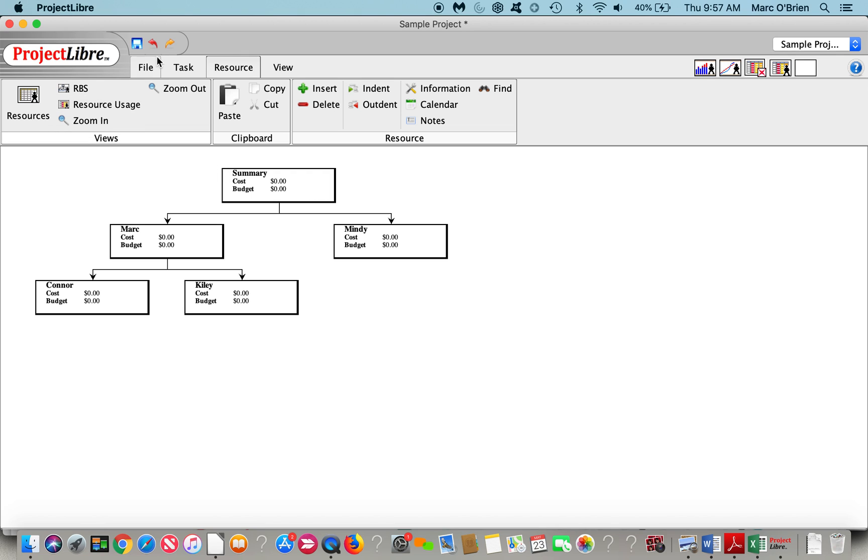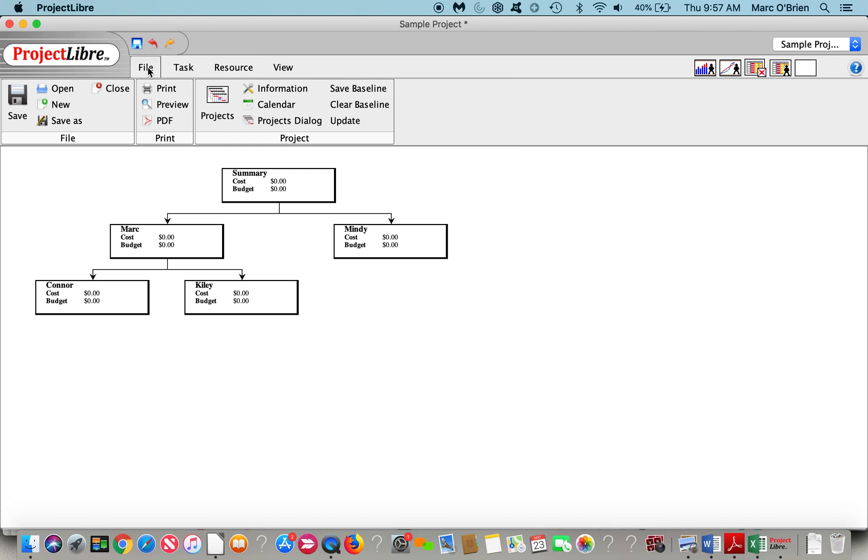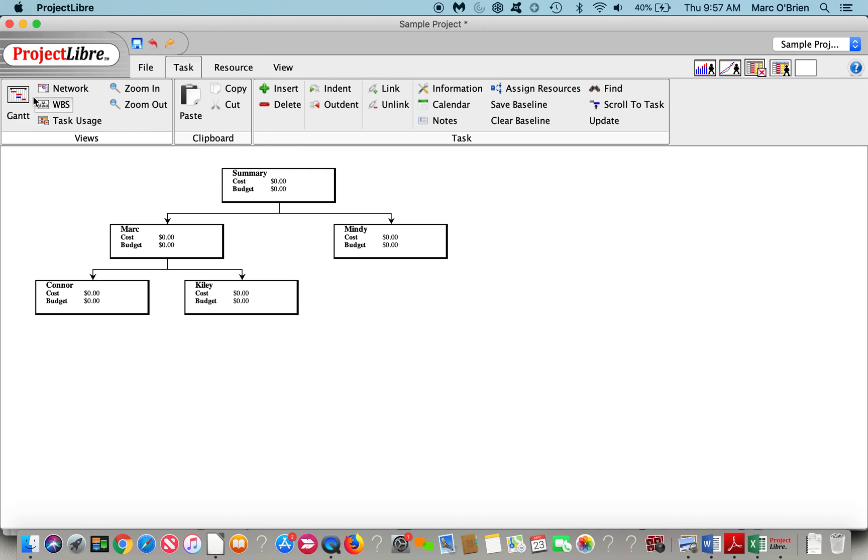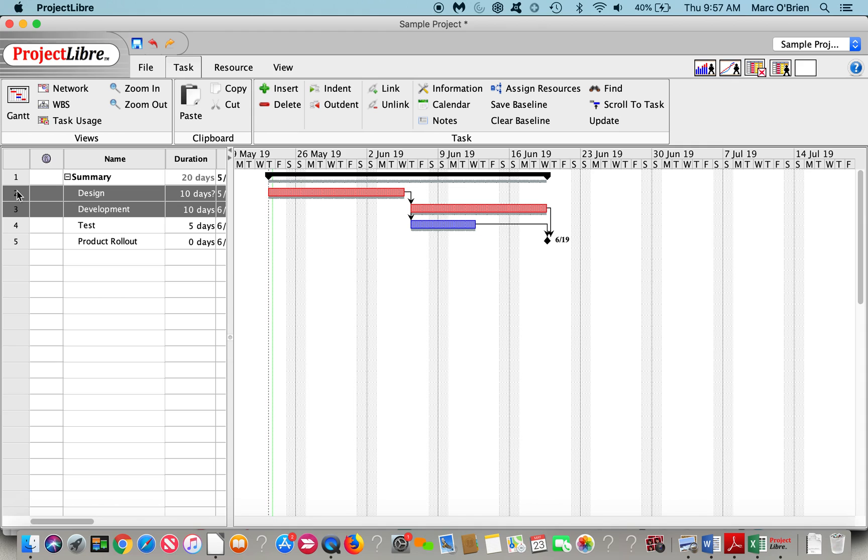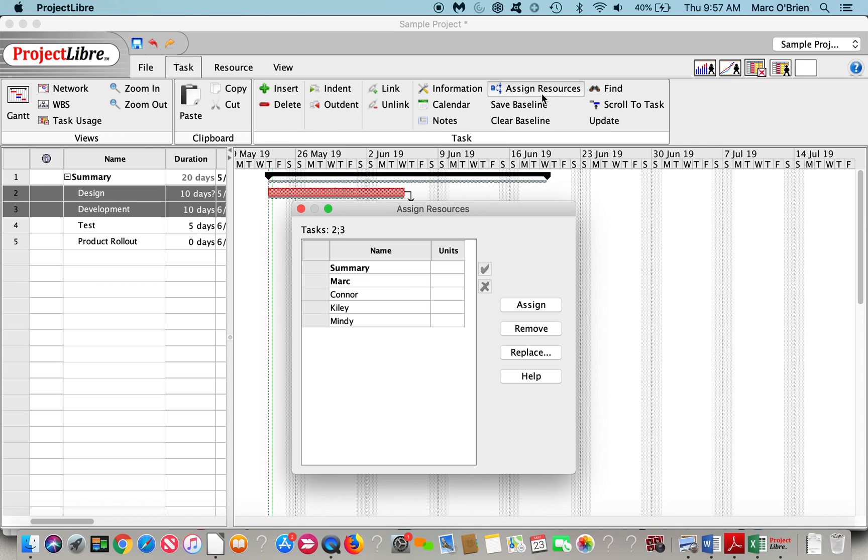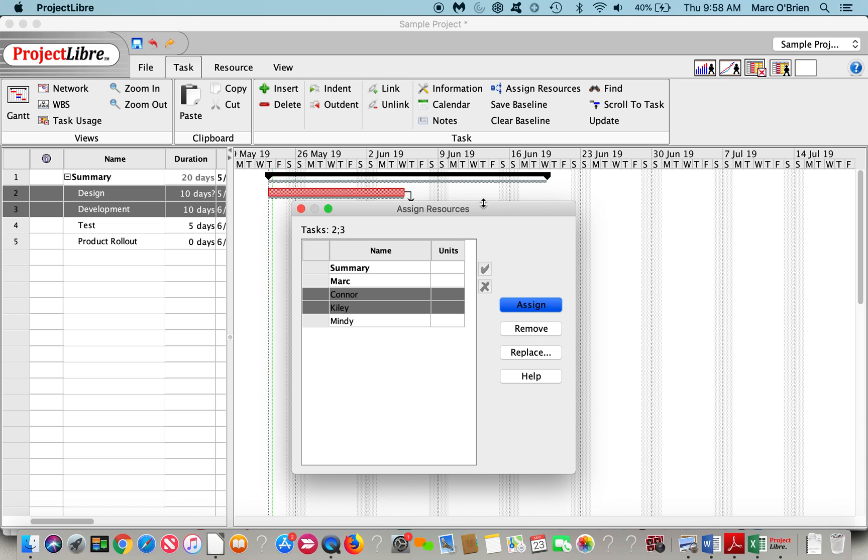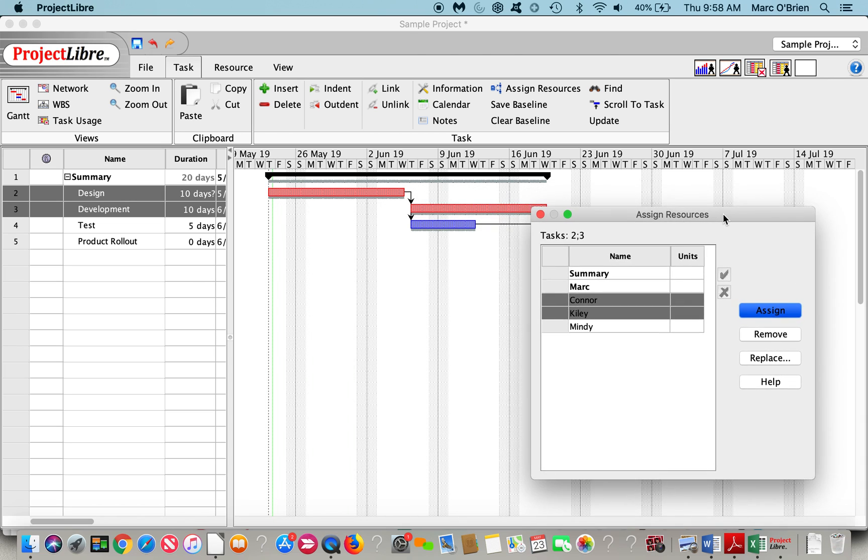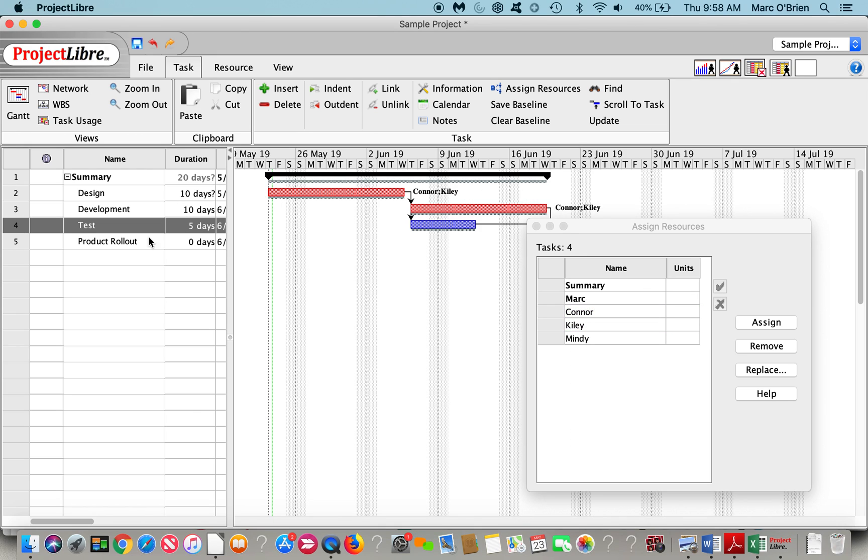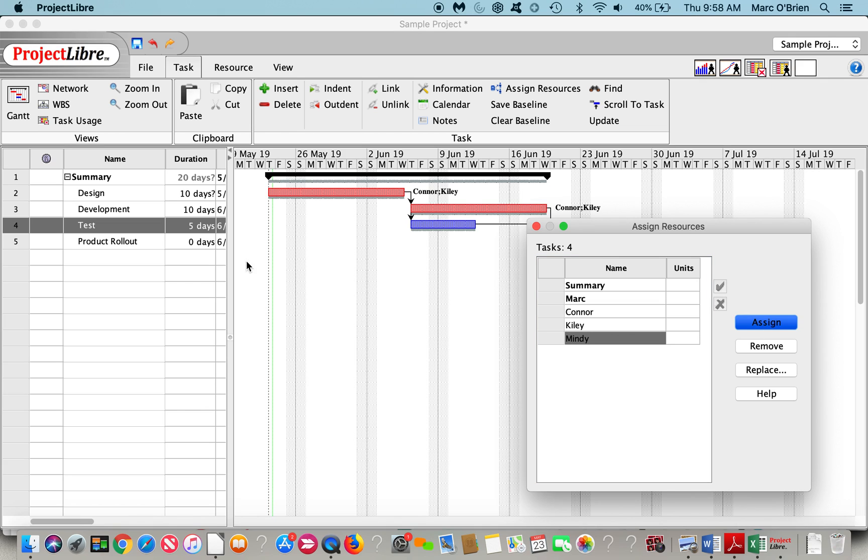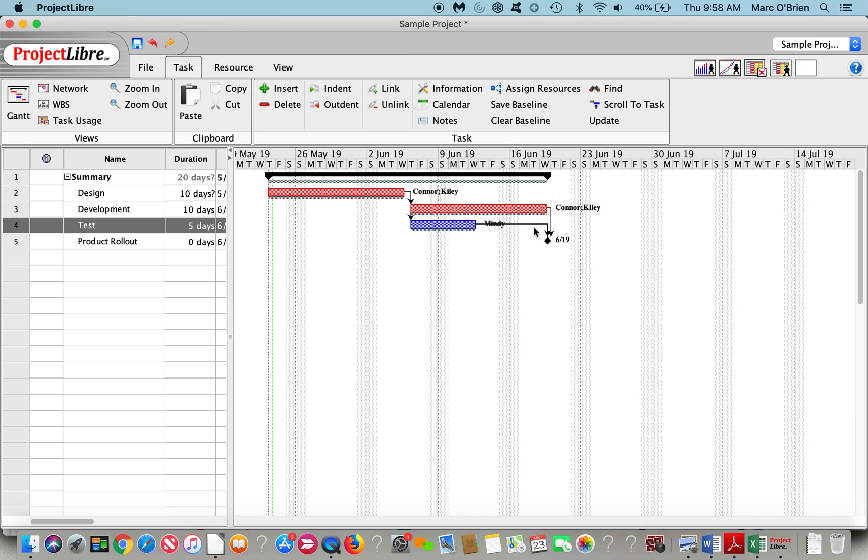I'm going to go back to the Gantt chart, and we're going to assign those resources. I could click on a couple of tasks here, and I can assign Connor and Kylie to both of those. You can see their names pop up there. On test, I'll put Mindy on test. So you can see the resources are now assigned.